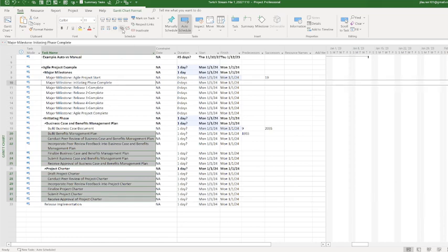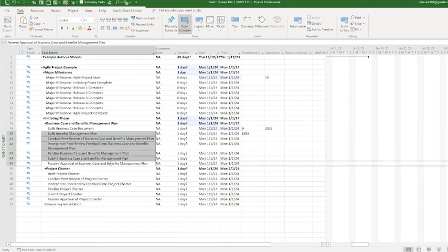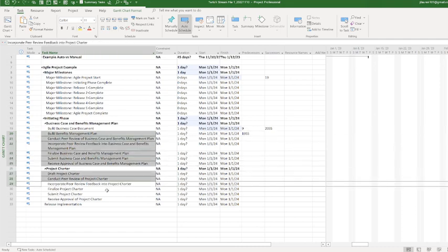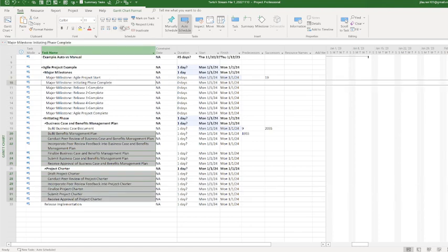Then you link everything. So in order to link everything the way I just did, on your keyboard, you have the task highlighted. You hold your control key down, and then you just start highlighting everything, if you're doing everything in sequential order, by the way. Then click. And of course, in task and schedule, there's this link. So I have this link button right here, and I just link it together. This is where you unlink tasks, so you don't want that.